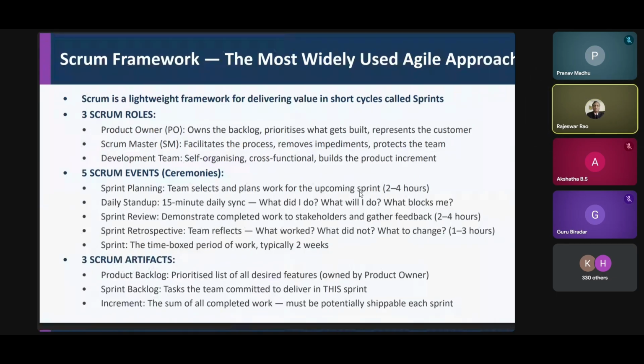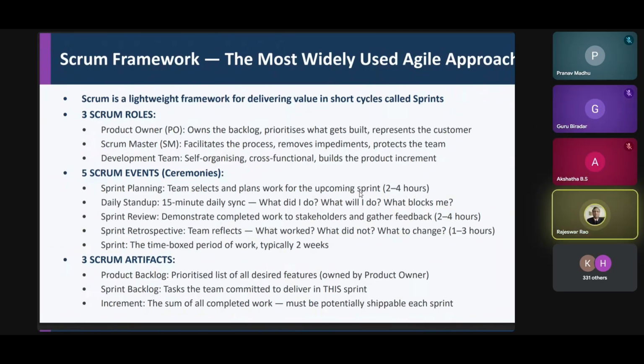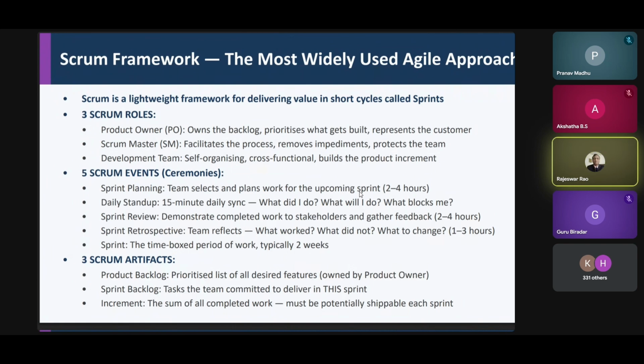The second is the sprint backlog. Not only the day-to-day backlog, you need to have a backlog at the sprint level because it impacts the overall timeline of the project. If you cannot control the project at a weekly level, it becomes uncontrollable as the project flows into the second week or the third week or the fourth week. All you are doing is accumulating the backlogs and you are not able to solve them. So the backlog documentation is extremely important, and sometimes it is worth putting a hold on the project and finishing out the backlog before it is restarted.